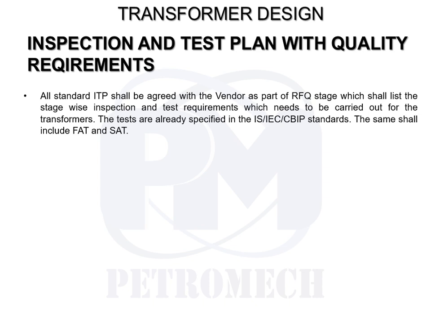Also, mindfully, we have to keep in mind that these tests require a schedule timeline, because we need to take an appointment from the independent agency if we are doing it from outside, let's say ERDA. So we have to send the transformer from the manufacturing facility to the independent testing lab agency. There they will perform the test.